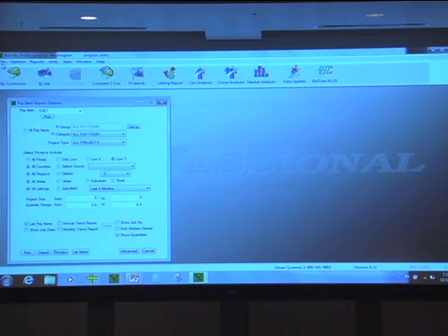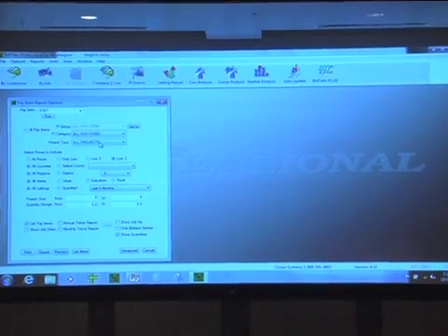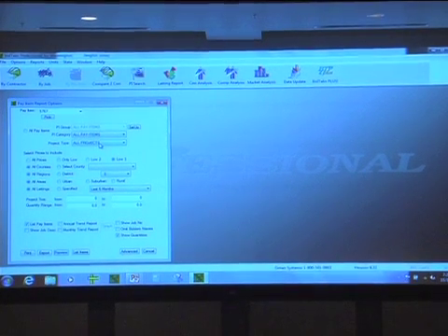I have a couple more things I want to show you just because I think they're kind of cool. This is more of my estimate review, project development hat type thing. You have an option here to do it by project type. You can take just those projects, like all your paving projects from the last 6 months, and see how those items, your pavement items, your CSBC, all those items on paving projects, are costing out as opposed to a structural project or a signals project. So you can see how the different types of projects influence the same bid items.